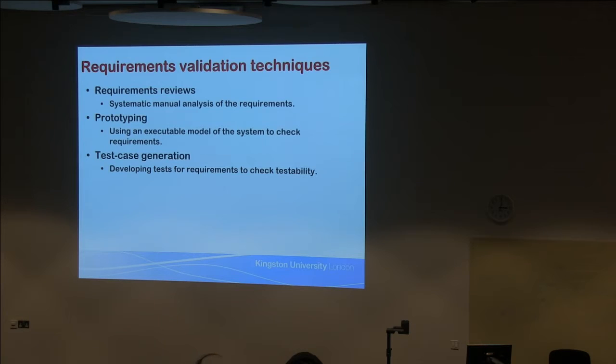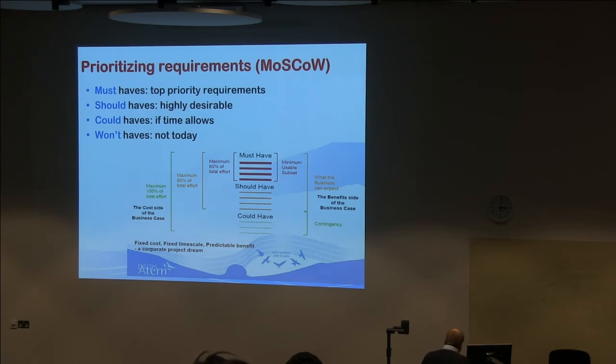So there's lots of ways you can do that. Review your requirements, prototype as we've talked about, and develop the tests for the requirements to see if they are actually testable, whether you can actually test that requirement down the line. Now, a key thing you will all do as well, hopefully, is prioritise your requirements. Unless you're some super multitasker, you are not going to do everything at once.